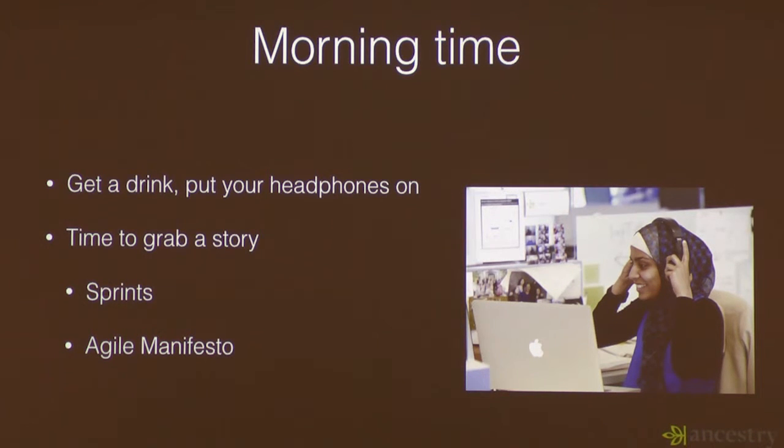Who here knows about Agile? It's pretty big. I think everyone should know it. So we use Agile processes. Typically, it's more like one called Kanban. We use one called Scrum, and we kind of mix these, and it's fairly light. But we have a thing called sprints, and a sprint is basically a 2-week block where we say, in these 2 weeks, what can we get done? And then we go through the list of all the features that our project manager wants inside the app, and we say, in 2 weeks, what can we accomplish? And we break them down into these things called stories. So usually in the morning, if your story from the previous day is done, you'll grab a new story, and you start working on that.